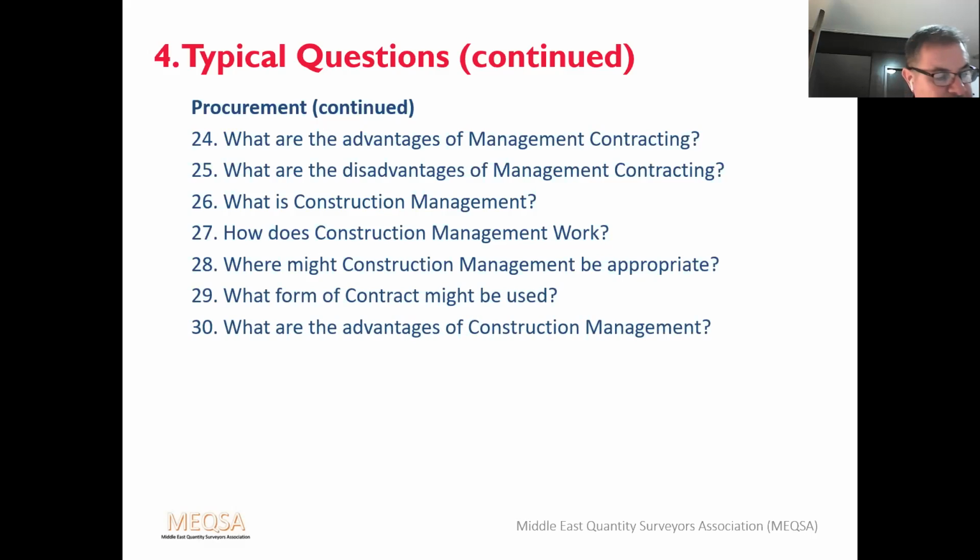What are the advantages? Overall construction duration is reduced by overlapping the design and construction. The construction manager can contribute to the design and the project planning process. The roles, risk and relationship for all parties are clear. The changes in design can be accommodated without paying a premium. Prices may be lower due to direct contracts with trade contractors, and the client has means of redress to trade contractors through direct contractual links.